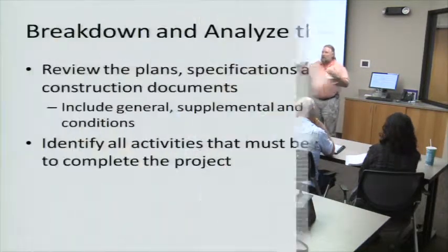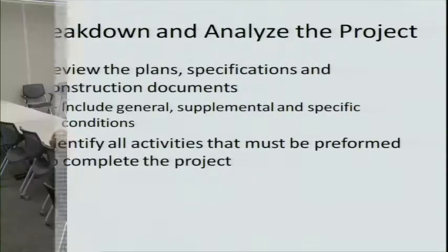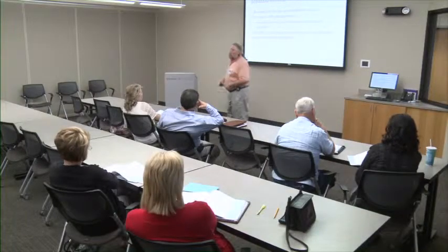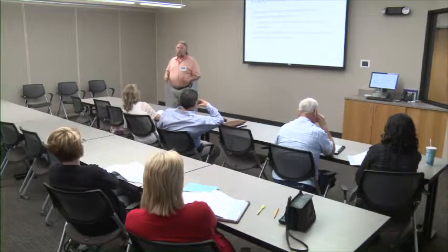Well, an activity, and I'm sure there's another slide in there to tell us what that is later, but an activity is essentially an item that we're going to do. We're going to dig a footing. That's an activity. But we also may break it down into even smaller activities. What are the activities in building the footing? It's digging, steel, concrete. So that's what an activity is. An activity is something that holds merit.